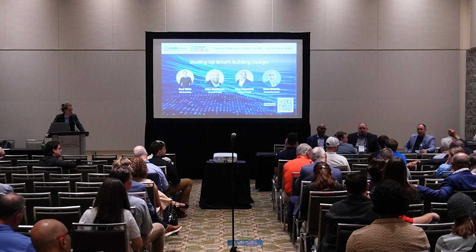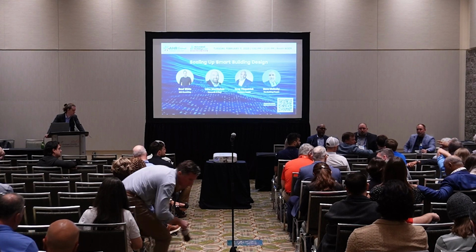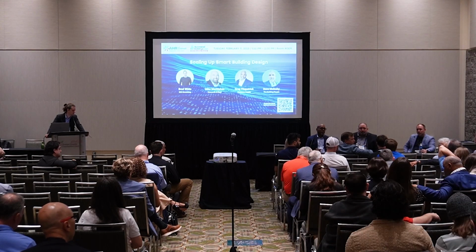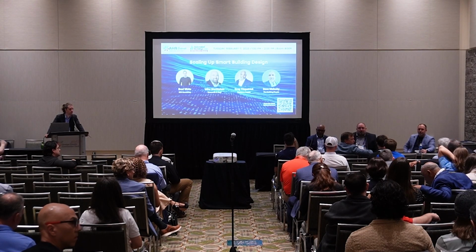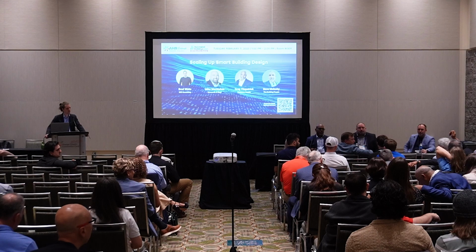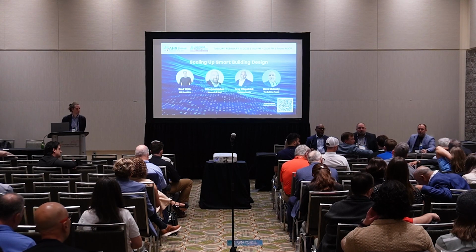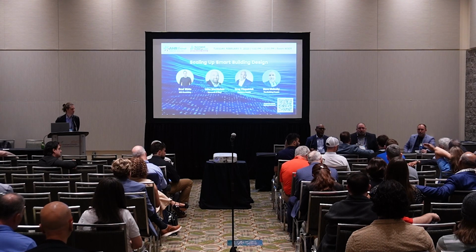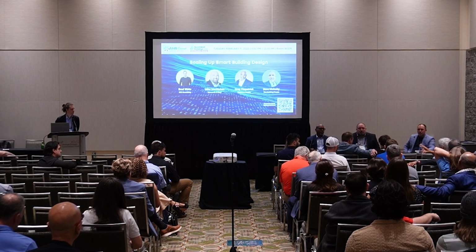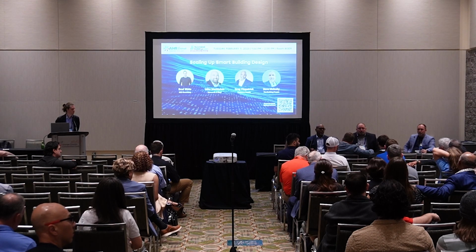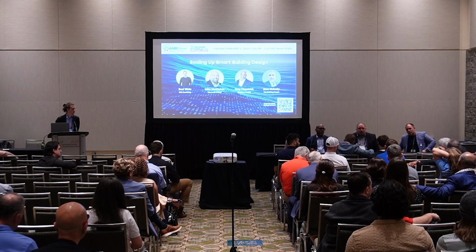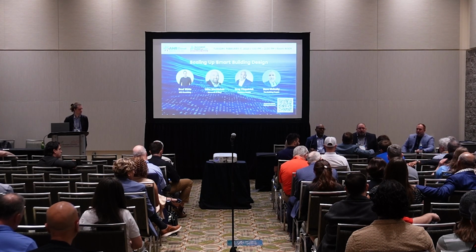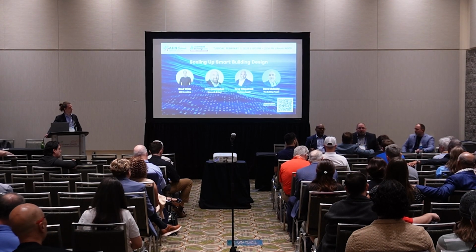I think the biggest challenge in commissioning is that currently they look at individual systems to determine the direction of operation. What we're looking at now is a smart building where all the systems are integrated together, holistic, where we've got card access, CCTV, lighting controls, HVAC, power monitoring. So when a guy walks in, he swipes the thing, the lights come on, HVAC equipment comes on, the power meter figures it up, and then a utility bill is created. There is no script. You don't see commissioning agents producing that script and testing that procedure. They do the individual systems, but do they ever do a full integrated test? It doesn't exist yet, but it's coming. Totally agree.